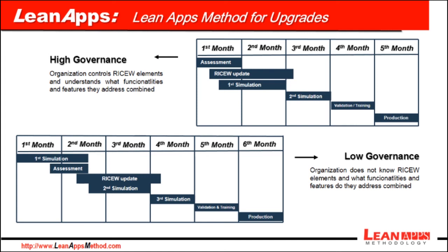Just having a list of custom objects and knowing which ones are still in use is not enough. For instance, you may have an extension composed of 2 triggers, 1 package, 2 forms, 3 stored procedures, which may be replaced by a new core feature that Oracle is bringing in the new release, or maybe the business requirements which demanded them are not valid anymore. Knowing those things in advance makes all the difference.